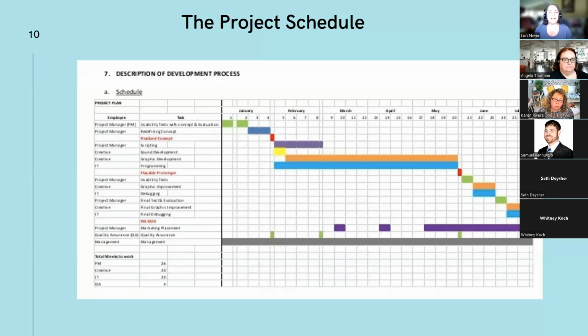And one of the things I like to start with when there's a change is to document the impacts. How does it impact the budget? How does it impact the schedule? How does it impact the resources? How does it impact the risks? And then make sure that the customer knows, whether the customer is my manager or a paying customer. Okay, you asked for this. Here's how it's going to impact. Are you sure you want this to occur? And then go into those changes of the charter and so on.